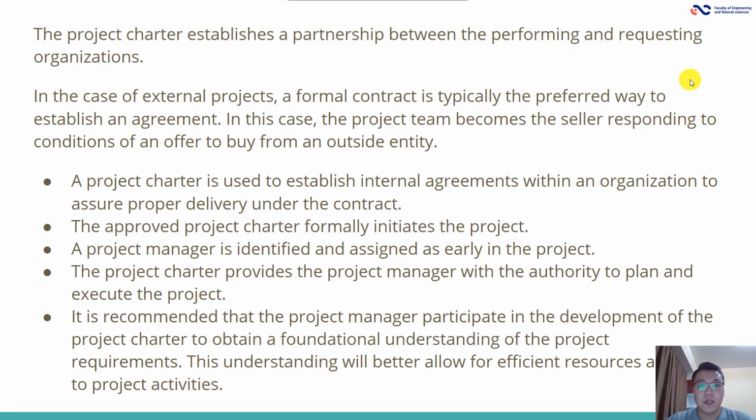The project charter establishes a partnership between the performing and the requesting organizations. In the case of an external project, a formal contract is typically the preferred way to establish an agreement. In this case, the project team becomes the seller, responding to conditions of an offer to buy from an outside entity. A project charter is used to establish internal agreements within an organization to assure proper delivery under the contract.